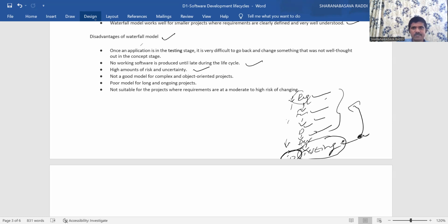For example, we understood some requirement and documented it, then the feasibility study is done, then design is done, then development is done and testing is done. For all these phases we assume everything is fine. Then when we give this feature after testing to the customer, meaning we deploy it to the customer environment, the customer sees that feature for the first time and says it is not what I required or expected.